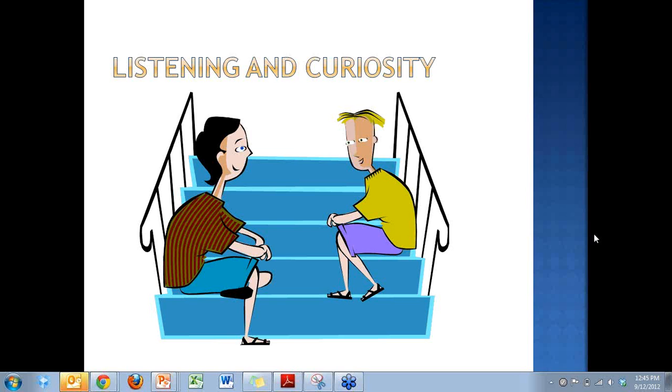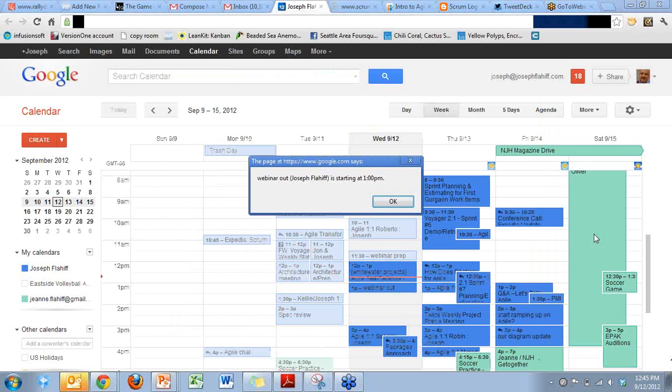Okay. Yeah, this is best practice: you use the last 3 or 4 sprint velocities and take an average across that. That's probably about what you're going to do. Okay. Yeah.